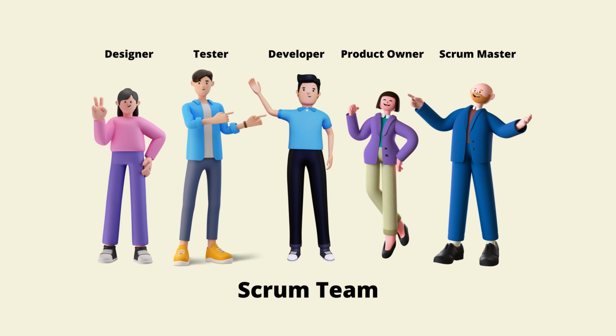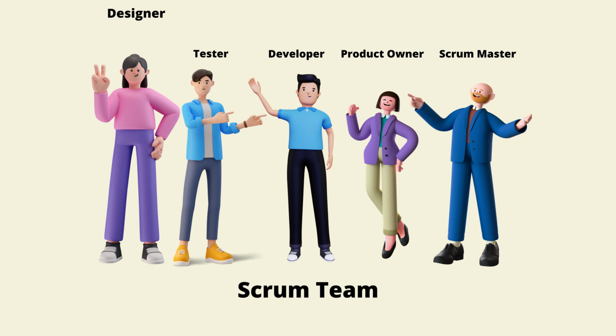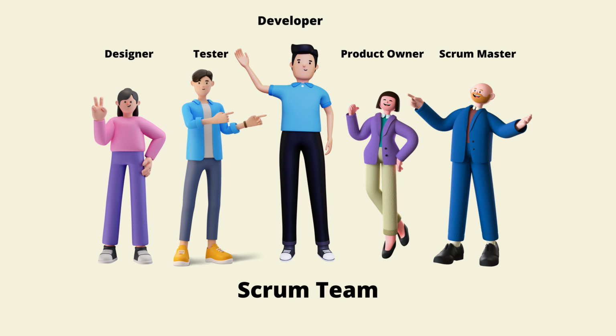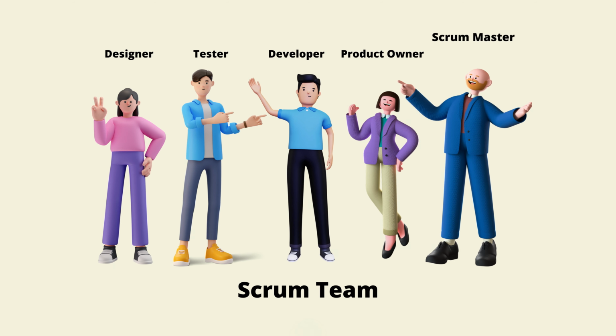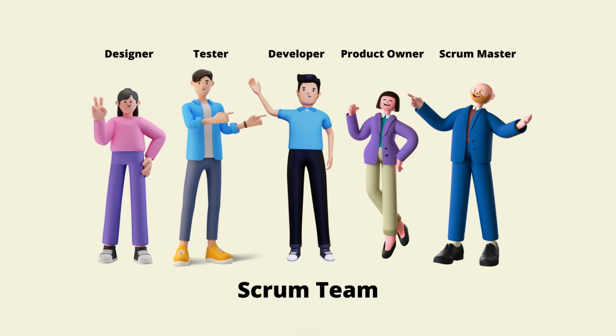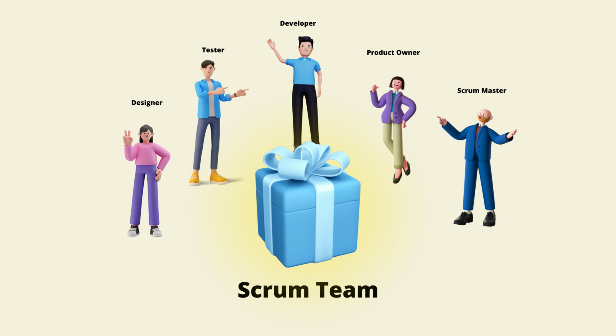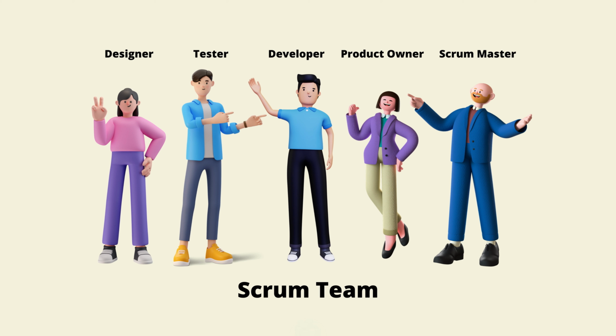Another key aspect of Scrum is that it wants component teams. What this means is it breaks down silos. It takes people from different areas and puts them together into one team of 10 people or fewer to work on the product and have really good communication between them all because they're all working in the same team towards the same product, towards the same goals. The team should have all the skills necessary in order to create the product.